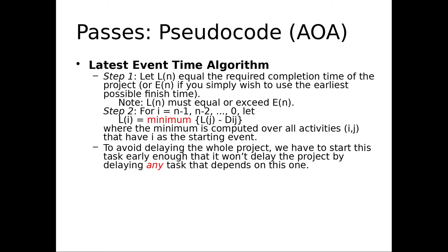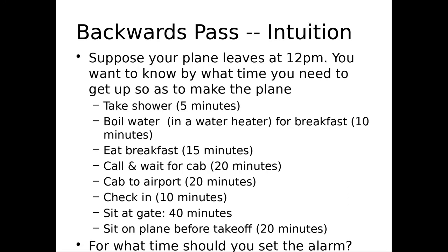By contrast, the backwards pass is going to depend on the minimum time. So we're going to consider, if all these things have to be done, what's the minimum associated with their late start? In other words, the latest time it could start without delaying us from getting to the plane, we have to wake up no later than that latest start. Late start being the latest time we could start one of these things without delaying the whole project.